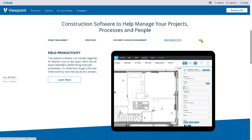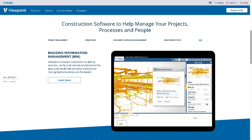The last section is BIM, or Building Information Modeling. This allows you to integrate BIM tools to visualize and coordinate construction projects in 3D. You can have 3D model access, viewing structural model slides with Vista data like cost or timeline. Clash detection helps you identify design conflicts before they impact construction. With model-based costing, you can link model elements to cost codes for more accurate budgeting. You can also collaborate with designers by sharing updates across stakeholders for improved planning and design validation. For example, before pouring concrete, a contractor uses the BIM model to ensure there are no piping conflicts with rebar placement, reducing costly rework.